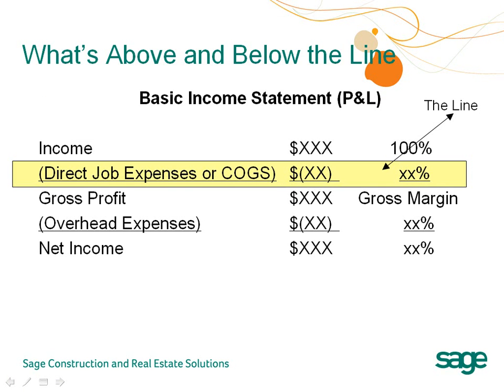You may be using off-the-shelf software to do your accounting, and it might even do some job costing. But without a consistent rule that says all job-related costs go above the line and all overhead costs go below the line, you may not be able to clearly track the gross margin of your jobs. I've seen many contractor financial statements where all labor is sitting below the line in the overhead range. So while you may be job costing materials, if you're not job costing labor, the job costing reporting is useless.